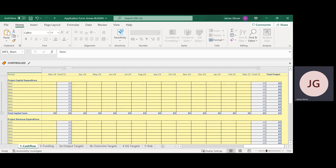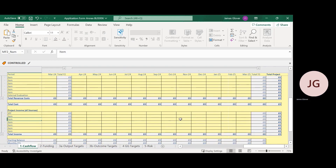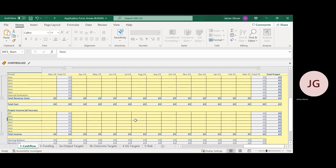If using professional estimates, these costs will need to be followed up by a quote. For project income, please list all income sources for the project. The Shared Prosperity Fund amount request will need to be broken down. We normally pay grant quarterly in arrears, so please reflect this in the cash flow. For community, social and new innovative projects, we may be able to consider other options such as monthly payments, but this is on a case by case basis with rationale required.